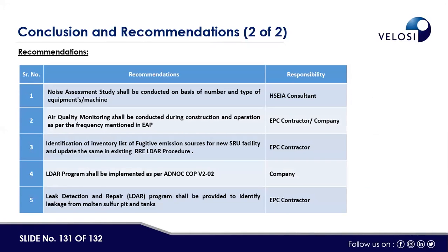And then we have given some recommendations as well on the basis of the ENID workshop that was carried out before the scoping study. A noise assessment study shall be conducted on the basis of the number and type of equipment and machines. It is the responsibility of the HSE consultant, meaning the environmental consultant. Then air quality monitoring shall be conducted during construction and operation as per the frequency mentioned in the EAP. It is the responsibility of EPC during construction and the company during operation. Identification of the inventory list of fugitive emission sources for the new SIU facility, and update the same in the existing LDAR procedure. This is the responsibility of the EPC contractor.